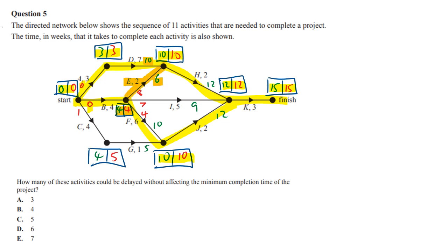So E does have a float. It's not on the critical path, but it doesn't show up in the figures. And you can say the same thing about I. So if we look at this one, again, we got 4 and 4, and then we got this 12 and 9, which shows there's a float, but it doesn't show up at the beginning of that. When the textbook always talks about these things, they'll often talk about the fact that, say, for example, you've got 3 things coming into the start, so you should do 3 boxes, but you should have done 3 boxes around here as well by the same logic. And that's one of the flaws in the system. If you follow my steps and my understanding of it, you'll probably more likely get the right answer. But again, it does show that B, 4 is the answer.